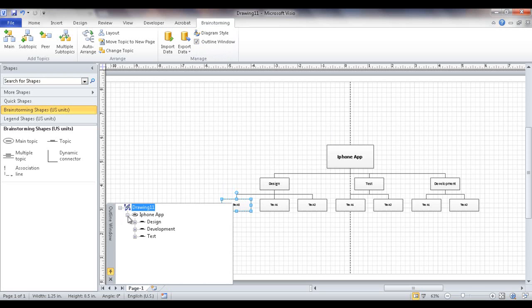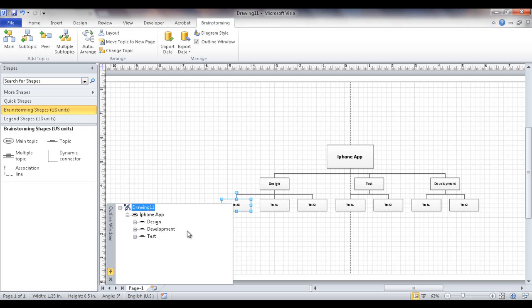One also neat thing about having it done here and then eventually having it done in a flow, if we have design come first, development come second, test come third, we can actually export this into Excel and it becomes a work breakdown structure that's numbered out and then put that into Microsoft project.